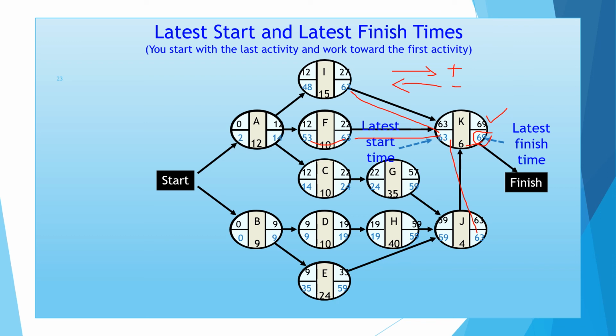But see here, actually here it should be 53, but we took 14. Why? Because here it is 48, here it is 53, and here it is 14. And while going backward, we should select the least one. So we selected 14. I think it's clear for you.